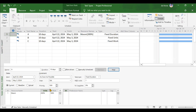Here is the twist: earlier both Mason and helper shared 160 hours, but now only one Mason does 160 hours in 10 days — meaning the Mason works 16 hours a day. The standard calendar is only 8 hours, so Mason is doing overtime, working twice the time. This increases cost and reduces productivity since the activity still completes in 10 days.